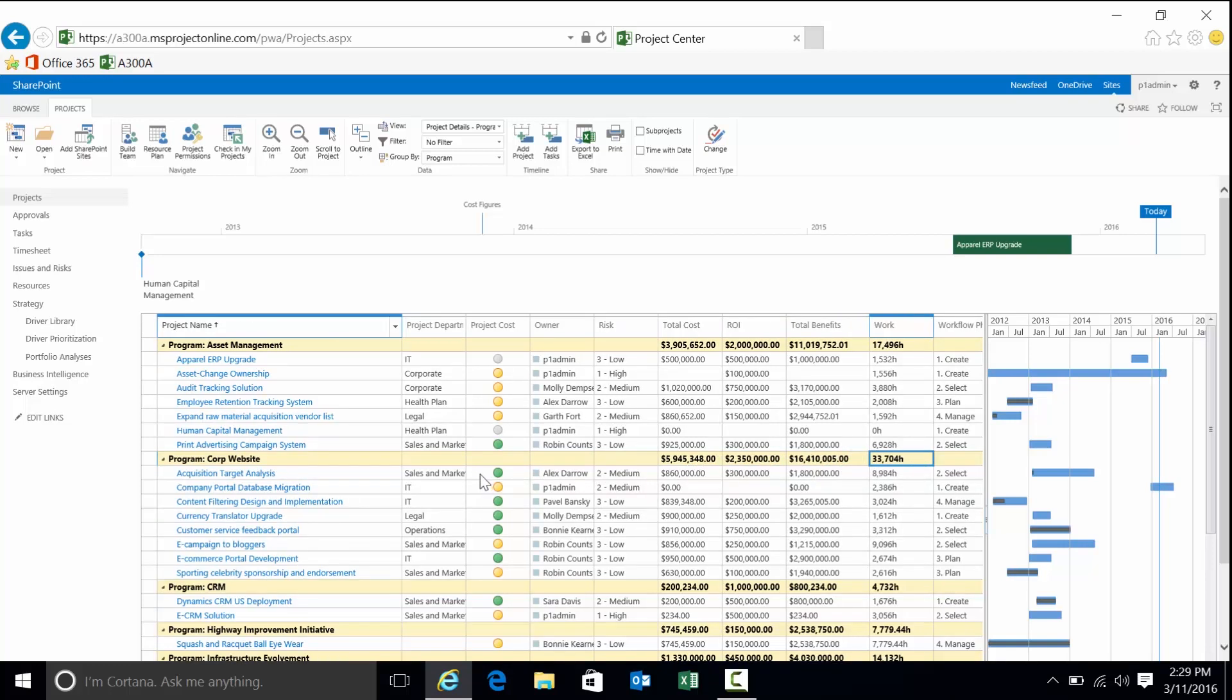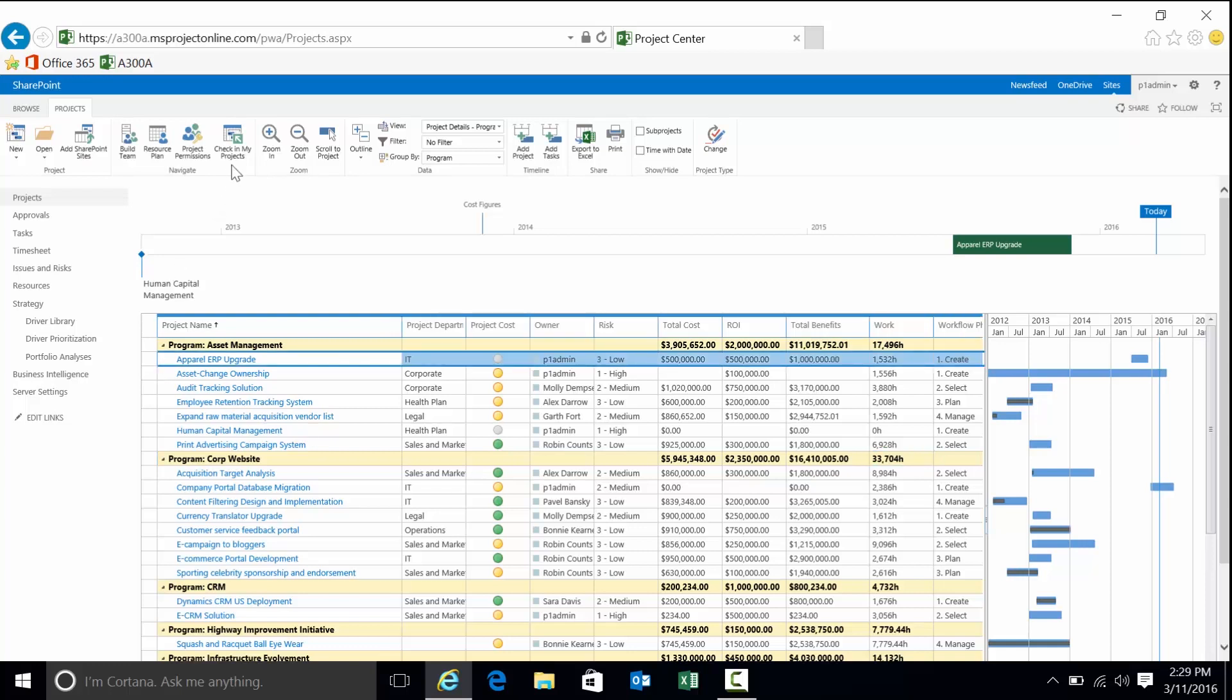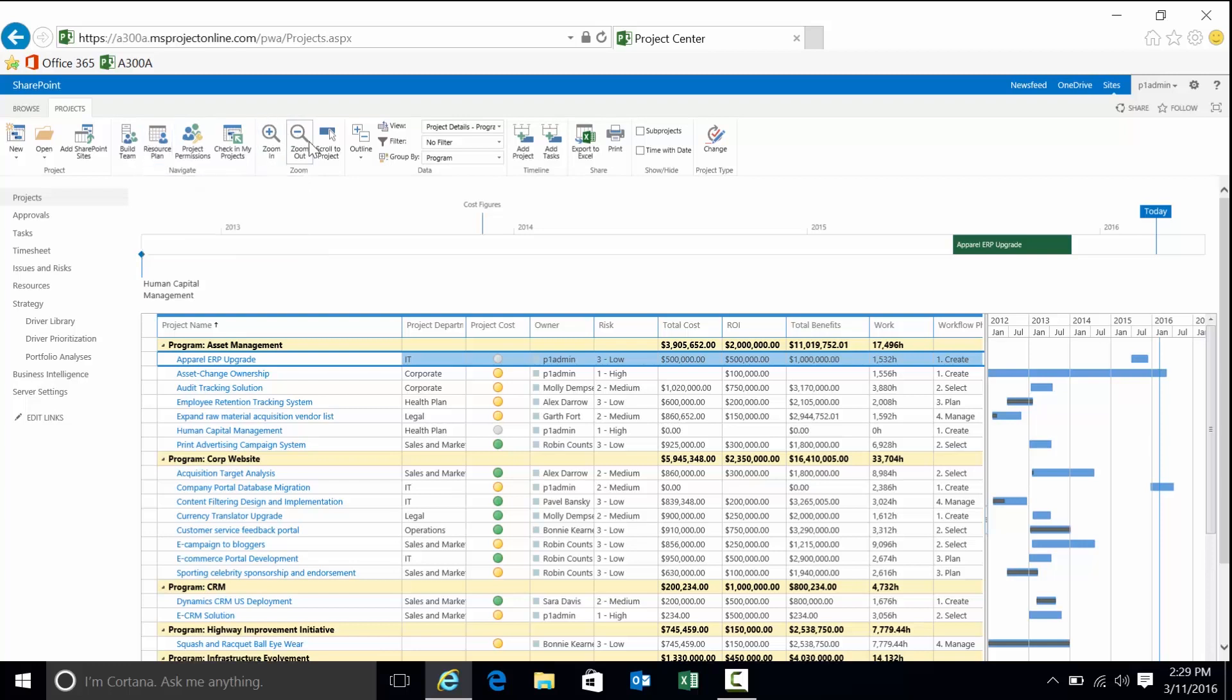Note that we can have graphical indicators for multiple KPIs. Cost and schedule are very common, and it's also very common to have them based on automatic calculation, for instance, the variance between your baseline and your actuals. Based on what I have selected, that will determine what the ribbon up above will display for functionality. Depending on whether or not I have items checked in or checked out, that will also determine whether some of these items are enabled or disabled.